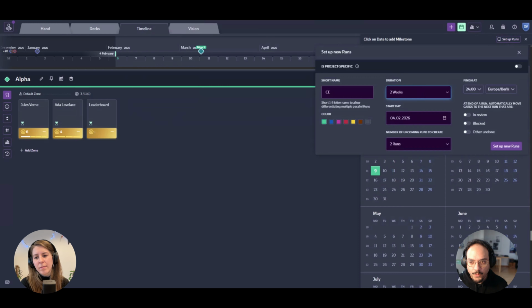I prefer 2 weeks, but generally I would say there's really no rule. During the experimental concepting phase, or during pre-production, maybe you want to have shorter iteration cycles, because you are creating a lot of prototypes, and I think you should aim at keeping prototypes short and minimalistic. Maybe you cannot plan too far ahead because you don't know what you're doing. You're experimenting, exploring different areas and so on.